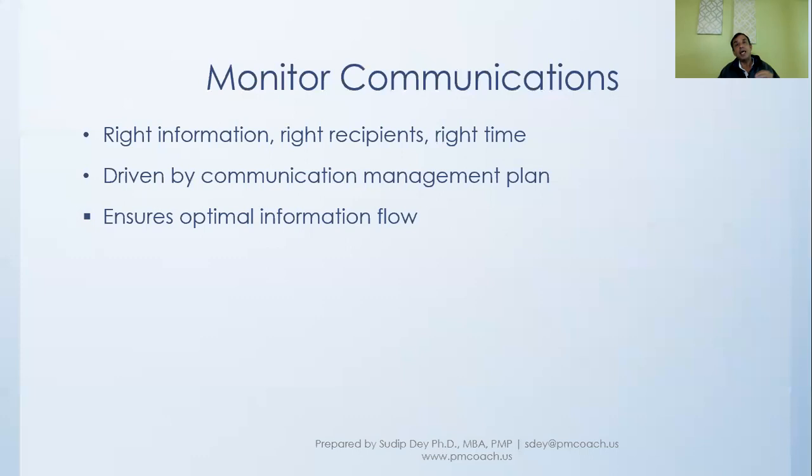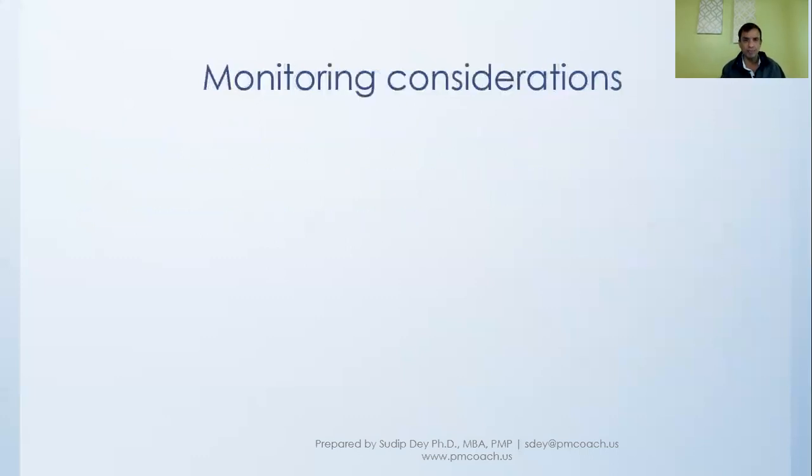Then we'll see if the change that we have made has its effect, or if we have to make more changes. So through this process, there is a continual improvement in the way we are communicating to the stakeholders. This is how we should go about monitoring communication. And this is where the change request comes in, because when we see that some changes need to be done, that has to go as a change request.